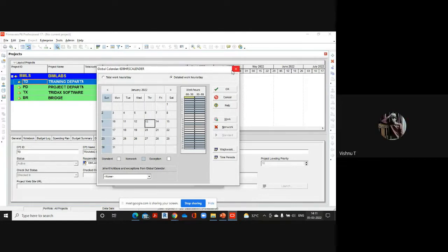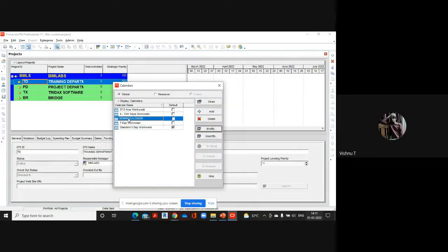You can name it as 6-day work week calendar. Okay, 6-day week. 6-day, 8-hours calendar, if you are following an 8-hour schedule. And we need to tick that button in the checkbox. That you can do after creating the calendar, or now itself you can do, no issue.